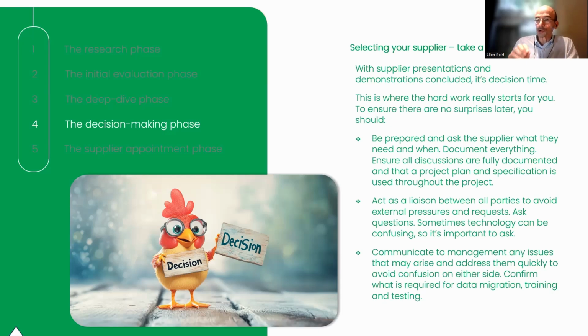Our view is that you should be taking up references as part of your decision making. The references should form part of whether you're including or excluding this provider from the next phase. Just like looking at the contracts should be part of deciding whether you're including them or excluding them. If the contract looks unfair, let's find that out before you choose your preferred supplier.